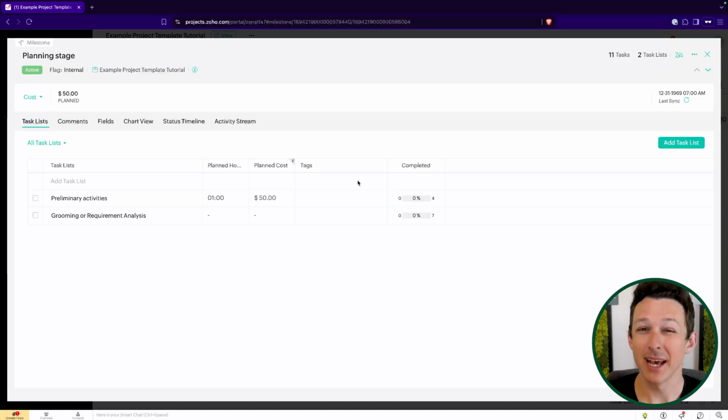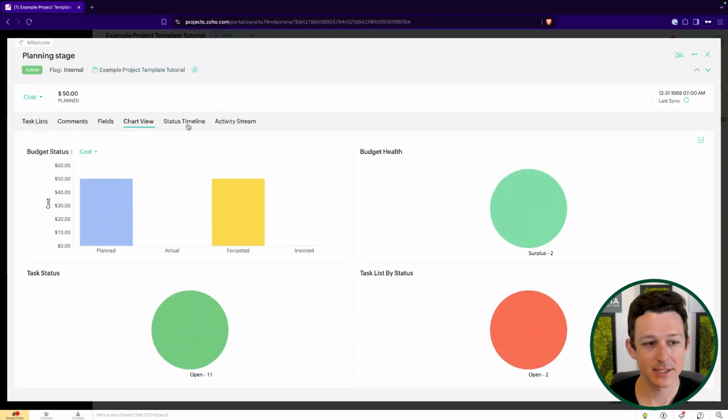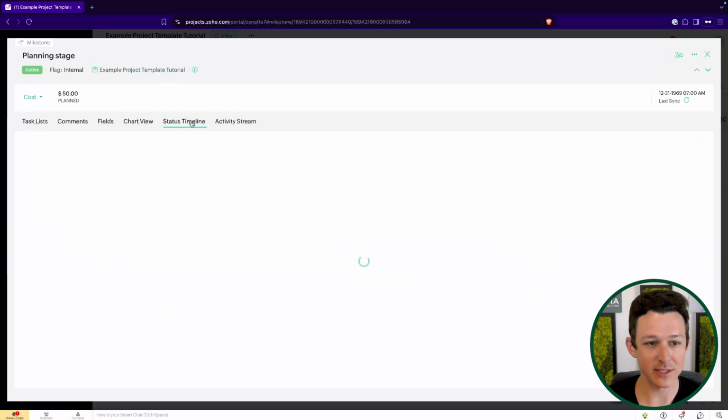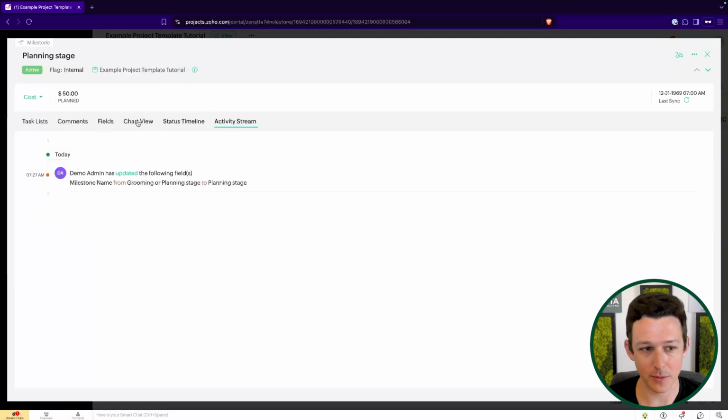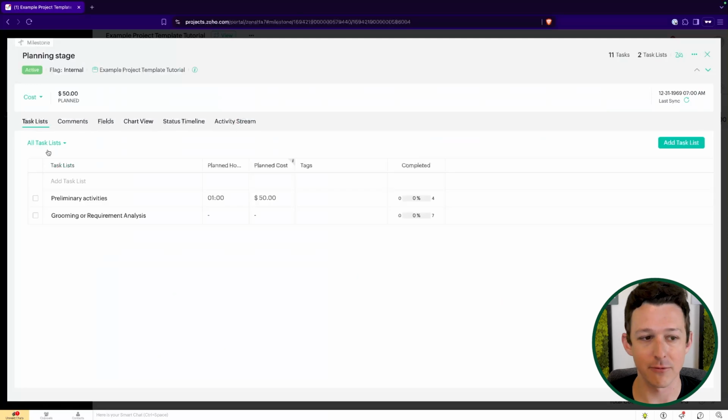So an important thing is you don't log time against a milestone. You don't check off that you've completed a milestone. These are really just a phase that contains subsets of work within them that we can track discretely, right? So we can see how are we doing on a particular milestone. The important thing is here, different milestones might be managed by different people. Different milestones might be running concurrently or separately. You might budget differently within each of them. So you can kind of group things out into these different milestones, again, just as that top level phase.